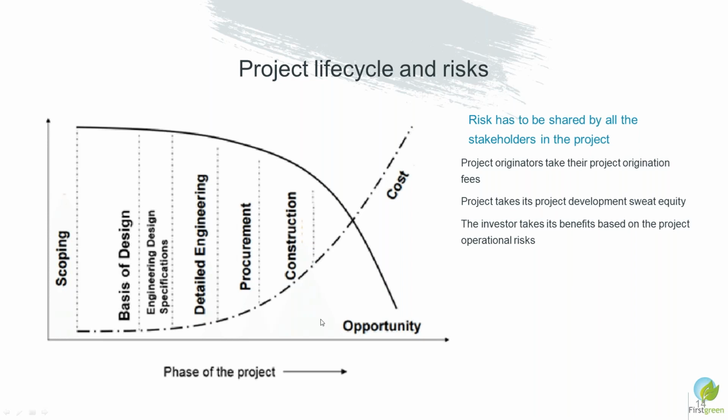So these risks are like, if you have taken some design related issues, maybe you have selected a wrong type of structure which was not required, and finally when you go for actual installation, the roof is not compatible with the proposed design. So there are risks with reference to the design related risk.